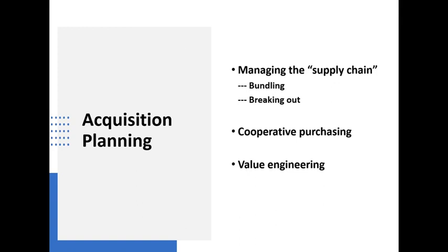A variation on this theme is something that probably a lot of you are familiar with as well. And that's where local governments or special districts are permitted to purchase off of state contracts. So the state enters into a contract competitively and then allows their governmental units to piggyback onto that contract and purchase under the same circumstances. As you can imagine, the marketplace contractors are very, very interested in being able to establish that sort of contract because of the volume of business that they are getting.